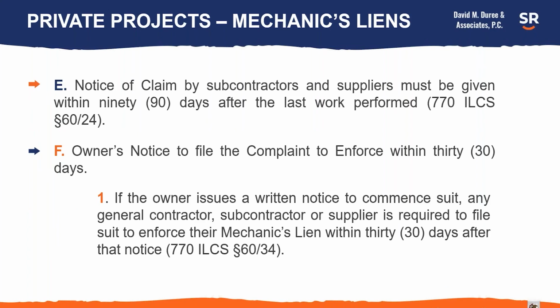As I mentioned, you have 90 days to file a notice of claim if you're a subcontractor or a supplier after the last work performed. With respect to the 2-year statute for filing a lawsuit to enforce your mechanic's lien, whether you're a general contractor or subcontractor or supplier, there is an exception to the general 2-year rule.